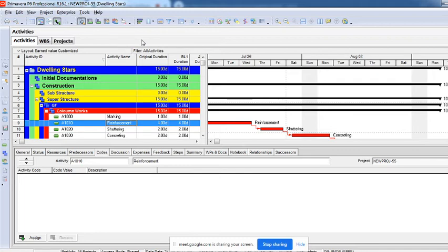Now roles can be multiple, so to understand the multiple work of a human resource, this option has been provided in Primavera. Usually if you give only a resource, say there's a resource called Avinash. Now when I assign Avinash, I need to know what Avinash is performing, because probably Avinash has multiple roles to play on that particular activity. So each work he does has different cost and different amount of time he has to spend on that activity. Everything has to be monitored with respect to the work he is doing. So when he has multiple roles to play, I'll definitely make them roles, and then I'll want to monitor it in terms of time and cost.